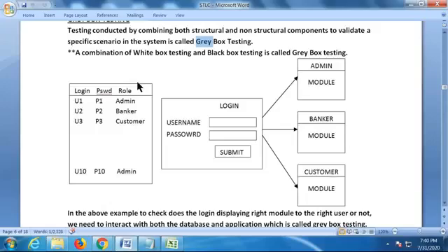As soon as the SRS is approved in the organization, the testing process comes into the picture, because we have to design test cases, prepare a test plan, review the test cases, and get the test data ready. We should get ready with all the test cases before we get a build from the developer. Before we get a build for testing, all your test cases should be reviewed and approved by your team lead, manager, or some client.